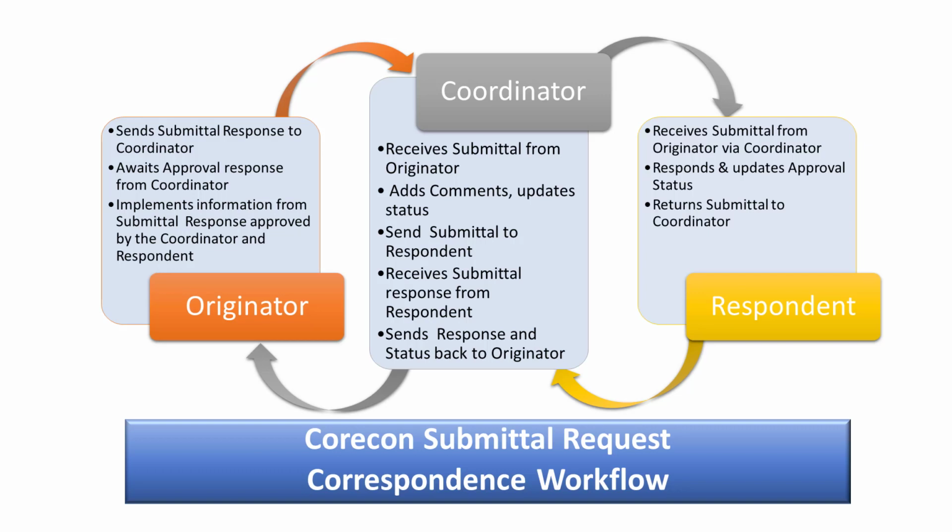There are three roles that we're going to include in this conversation. The coordinator is usually the Corecon subscriber. They mediate the correspondence between their company and the originator, in this case a subcontractor who's going to furnish and install, and their company and the respondent, which in this case will be first the architect of the project owner and then the project owner themselves.